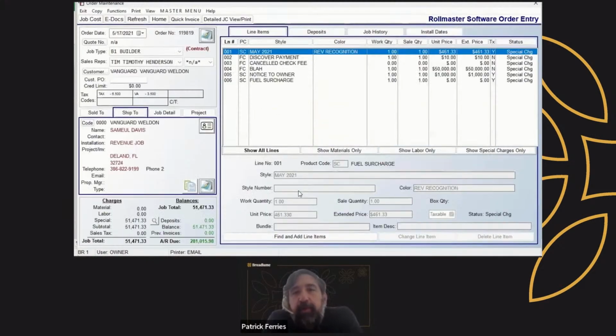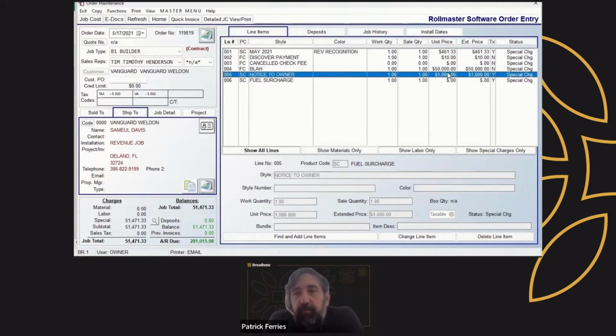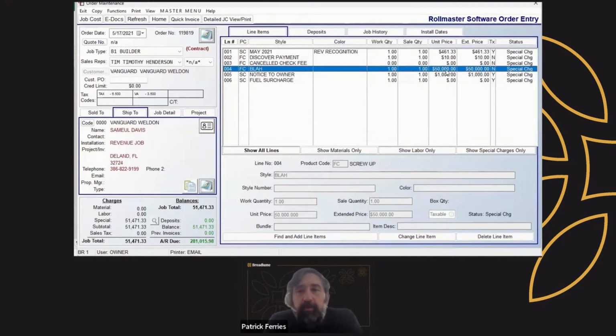In which case, I might just add a line item for each monthly schedule of values that I invoice. So here I'm just invoicing 50 grand one month, 1,000 the next month. So if you go this route, your individual jobs are not really going to have revenue on them. You're going to put all your revenue in here and just lump sum bill per the schedule of values. So I see this most common if you're doing a schedule of values in commercial work, which is AIA documents. If you don't know what AIA documents or schedule of values are, then this probably doesn't apply to you.